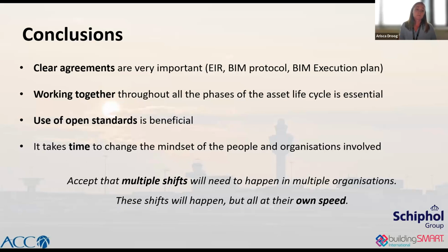We believe that clear agreements are very important. So we did that by introducing our BIM protocol, but also an information delivery manual and a BIM execution plan as part of the project phases, so that there's no more discussion about what needs to be delivered in the different project phases, and so that the handover goes a little bit more smoothly.